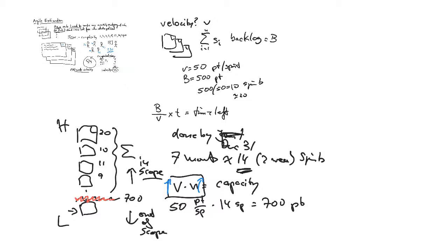Or, if you can't increase velocity, you can't increase the capacity, maybe you take one of the requirements that you think is very important, take it out, and put a different one in. You start to essentially force your stakeholders to prioritize. So those are some of the things that you can do to estimate in an agile environment.